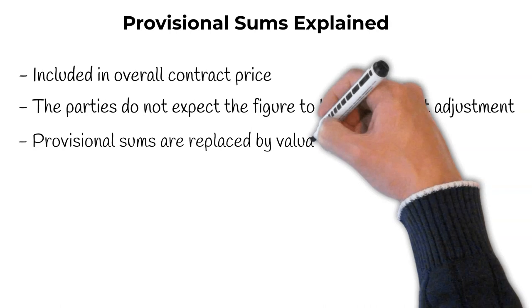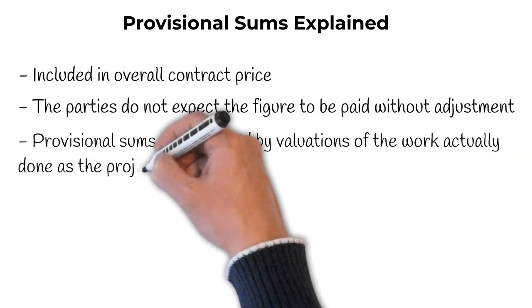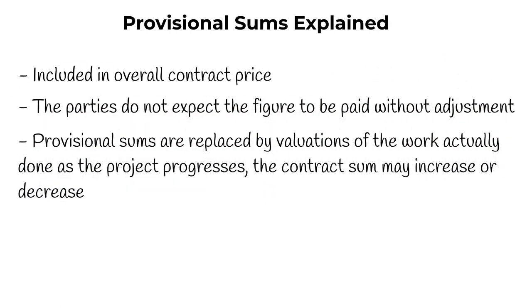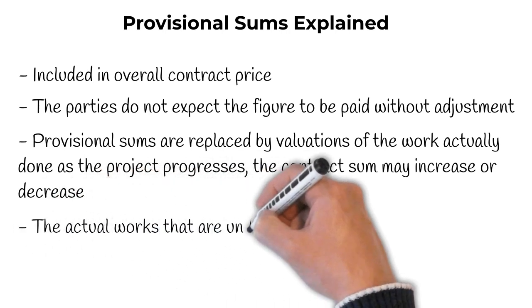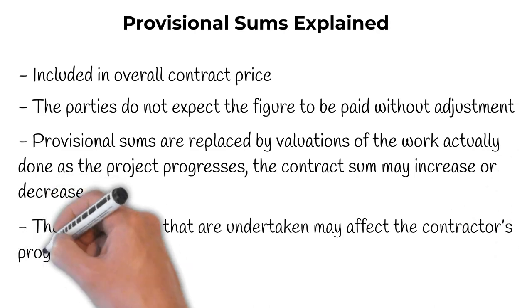As provisional sums are replaced by valuations of the work actually done as the project progresses, the contract sum may increase or decrease. In addition, the actual works that are undertaken may affect the contractor's programming, planning and pricing preliminaries.